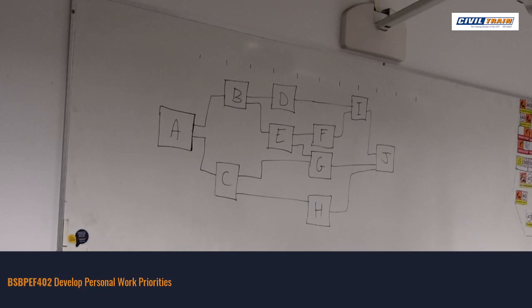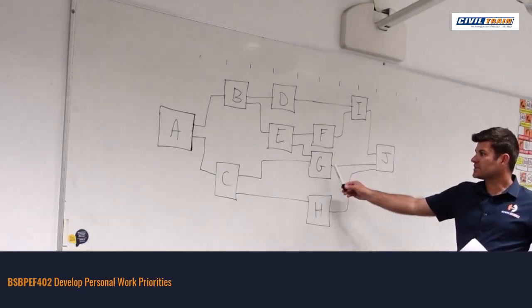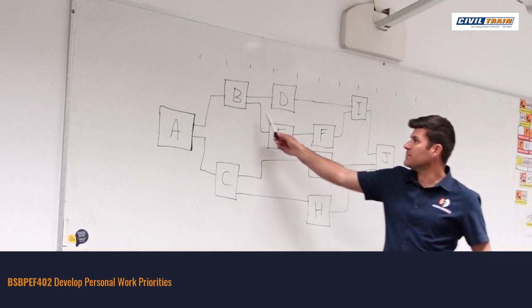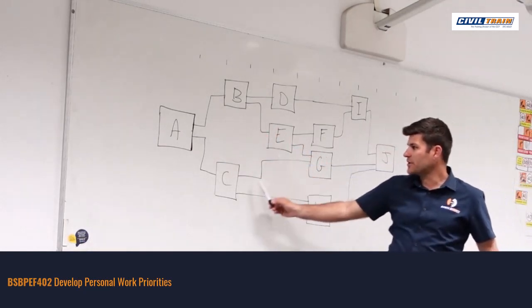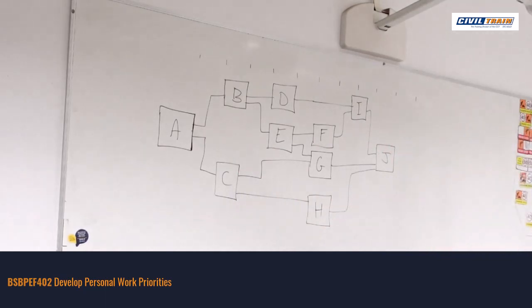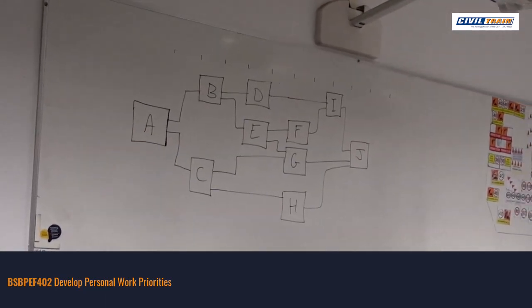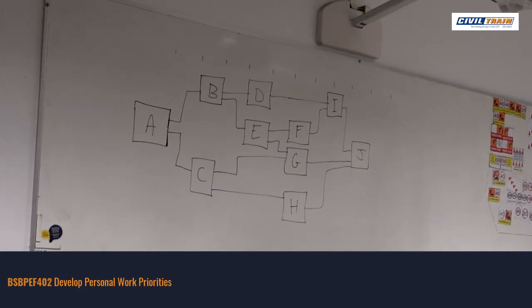So as you can see with the network diagram, I don't have any tasks that aren't linked. So it shows me that dependency line. And as you can sort of determine, if I was going to be doing task G, I can see the dependency lines. I know that E and B and A need to be completed, and I also know that C needs to be completed as well by linking that. So it's a very quick visual way of seeing what's dependent on what. And if these were task names, as I said, no doubt you could easily match that up quite quickly.